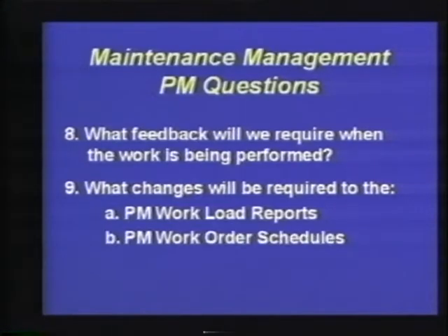The schedule, which is addressed by 9B, is the actual release of that capacity required from a load, and we put it into what we call an execution stage. When we get into the section on planning and scheduling, we'll go through the steps and the data elements and show you how that actually is accomplished.